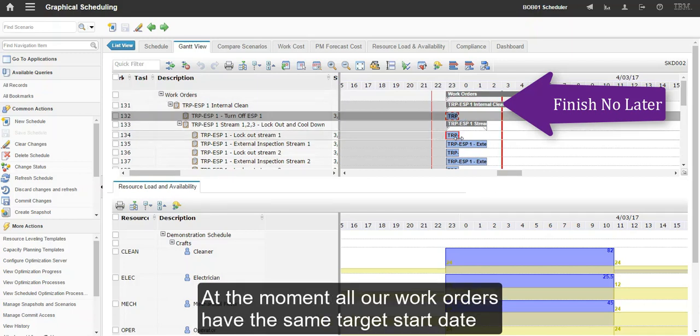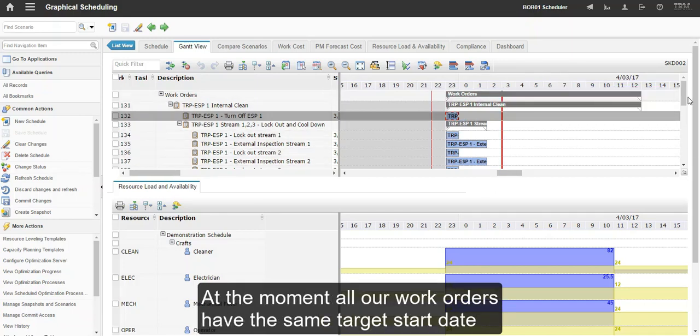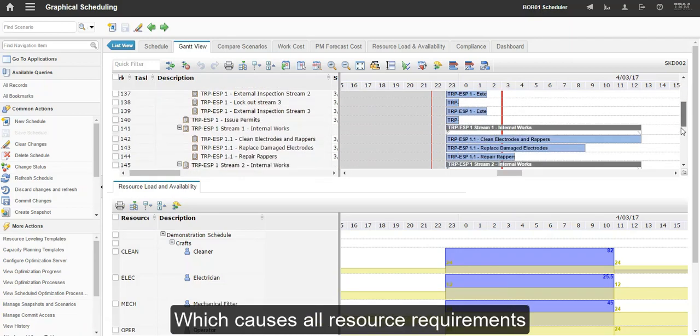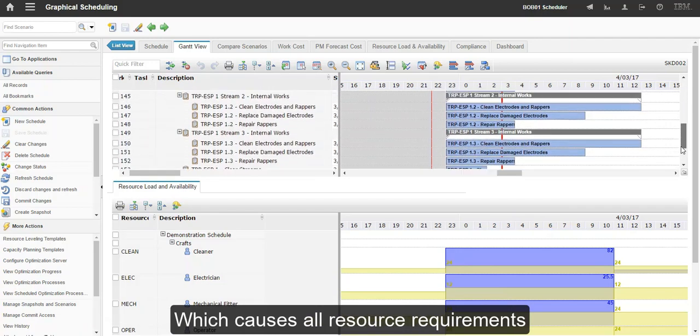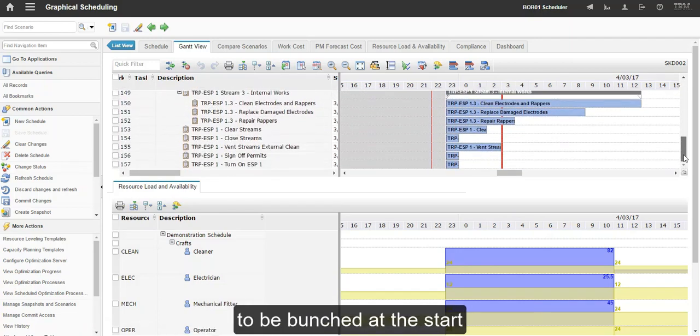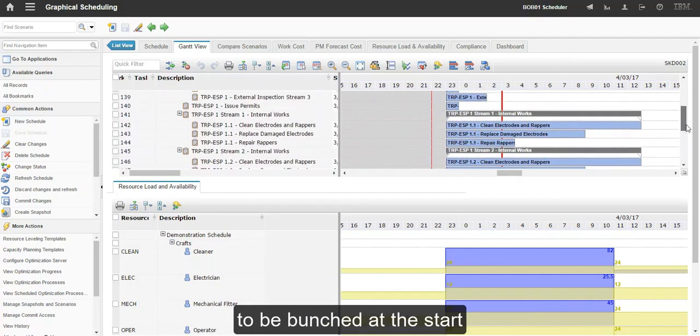At the moment, all our work orders have the same target start date, which causes all resource requirements to be bunched up at the start.